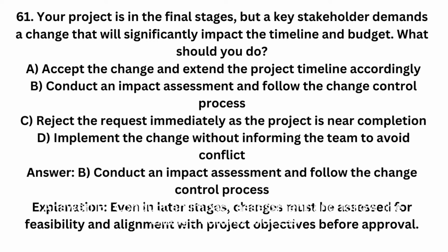Answer. B. Conduct an impact assessment and follow the change control process. Explanation. Even in later stages, changes must be assessed for feasibility and alignment with project objectives before approval.